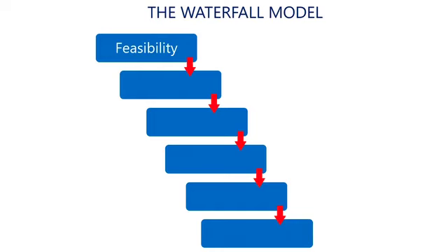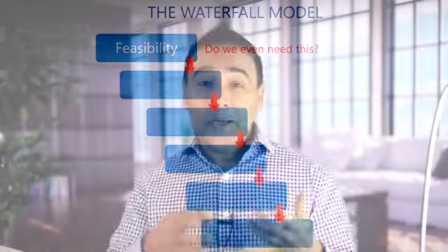Now, this is the stage where we ask the question, should we even go ahead? That's an important question. We could waste a whole load of money if we actually don't understand whether or not the software is at fault. Maybe the users who are complaining about this system aren't actually using it properly or weren't trained properly, in which case it's a training issue. And the software might be fine. So it's well worth investing a bit of time going around speaking to people, understanding what they don't like about the current system and what they might need from a new software.